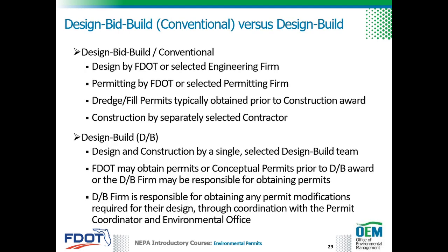From the planning phase to the design and construction phases, projects generally follow one of two project delivery methods, design bid build or design build. The design bid build process is a form of project delivery where FDOT either performs the design work in-house or negotiates with an engineering design firm to prepare drawings and specifications under a design services contract, and then separately contracts for construction services by engaging a contractor through competitive bidding.